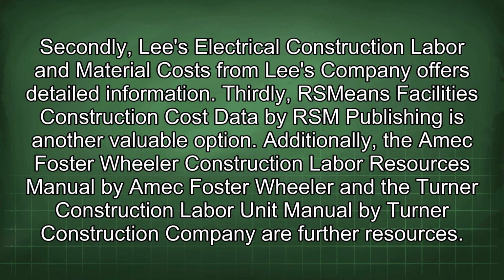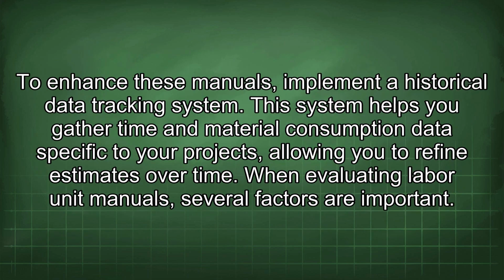Additionally, the A. Foster Wheeler Construction Labor Resources Manual by A. Foster Wheeler and the Turner Construction Labor Unit Manual by Turner Construction Company are further resources. To enhance these manuals, implement a historical data tracking system. This system helps you gather time and material consumption data specific to your projects, allowing you to refine estimates over time.